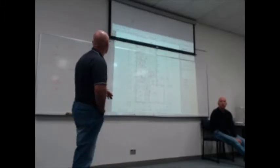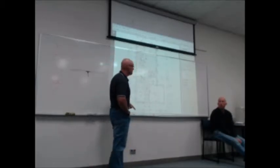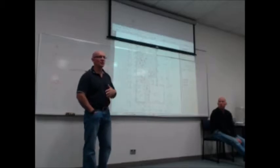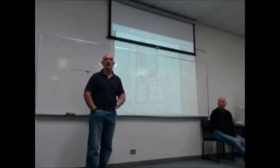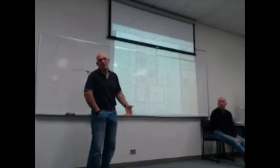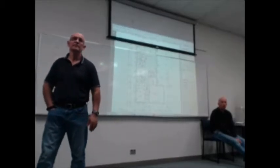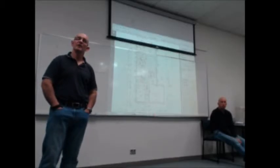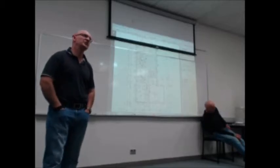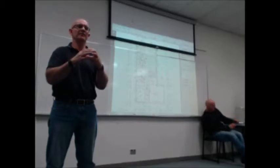And then to do the floor and walls, 1, 2, 3, 4 rooms. The first coat is the hardest one because you've got to set all your tape in there. Then you let it dry, then you've got to go back. For 20, 25 bucks. And it takes 50 meters. So 50 is a dollar a meter. Around the penetrations, like the tap holes and stuff like that, what were we using around them? Just allowing in that price. No, I'm just looking, I'm not worried about price. There's a couple of ways you can do it. If it's a nice